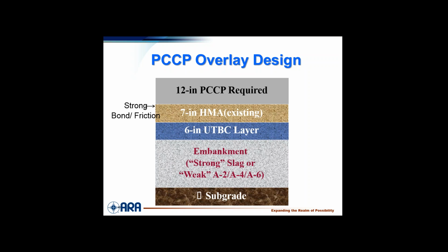We were able to extend from about 20 miles to 25 miles. The state gave the design build team $1.7 billion, said go as far as you can go with I-15 from this point. And so we extended, we designed from 30 to 40-year design, and we still gave back money, $200 million to the state.